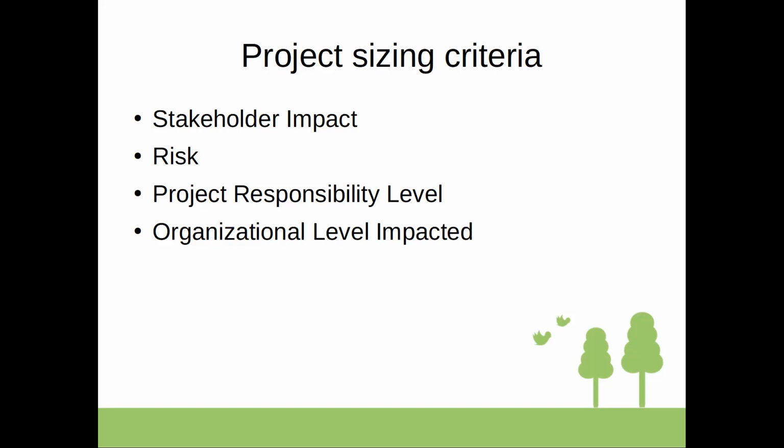Likewise, risks are a big factor, and from project management perspective, you start collecting project risks into risk register from the earliest date possible, basically even before project planning is started. And therefore, this helps.